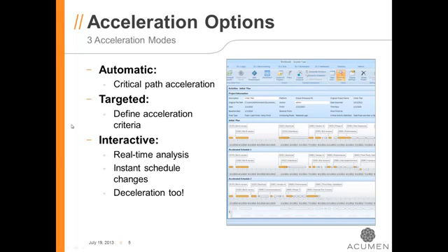Perhaps we were creating a proposal schedule that was based on some past work that we've done, and there was a higher or lower complexity factor to the proposed work than to the past work. We could load in that old schedule. We could change the sliders around to add or decrease complexity and then export it back. We might have a fairly seamless proposal schedule.